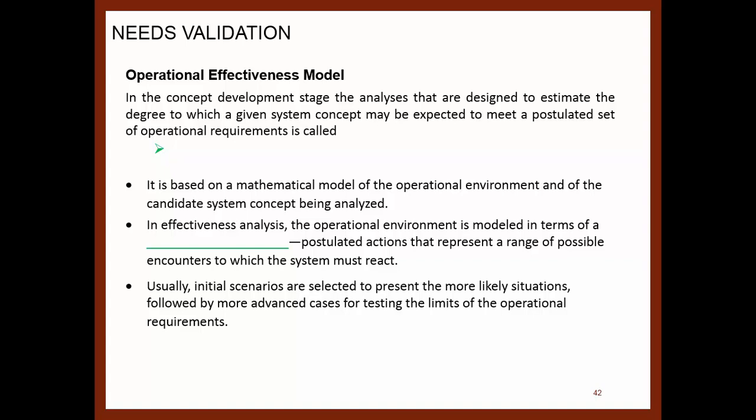Operational effectiveness model. In the concept development stage, the analyses that are designed to estimate the degree to which a given system concept might be expected to meet a postulated set of operational requirements are called operational effectiveness analysis. It is based on a mathematical model of the operational environment and of the candidate system concept being analyzed. In effectiveness analysis, the operational environment is modeled in terms of a set of scenarios: postulated actions that represent a range of possible encounters to which the system must react.